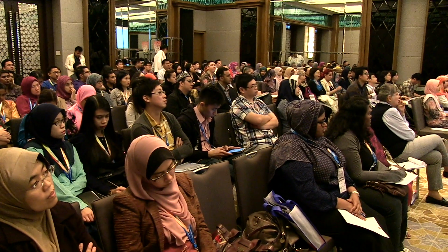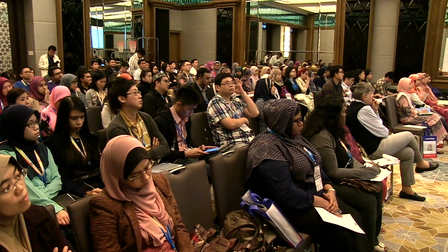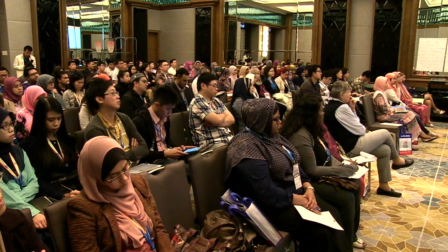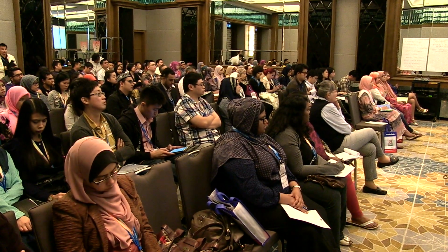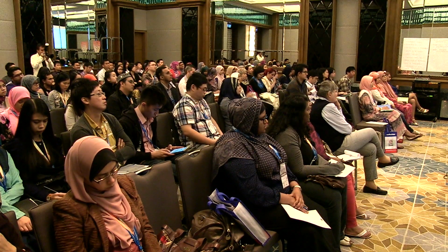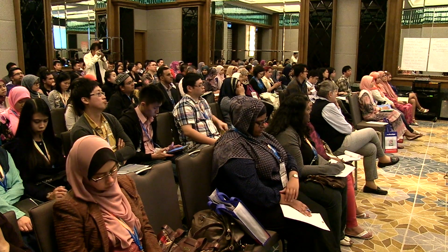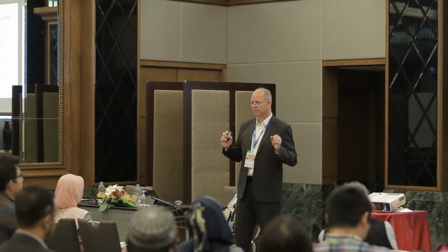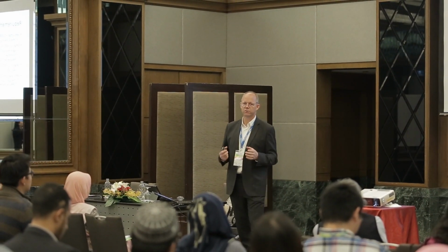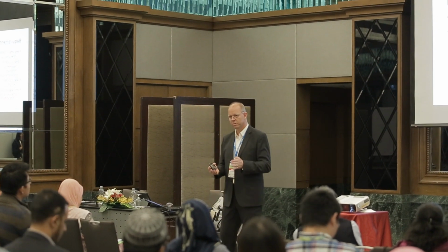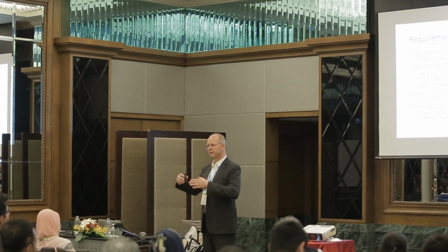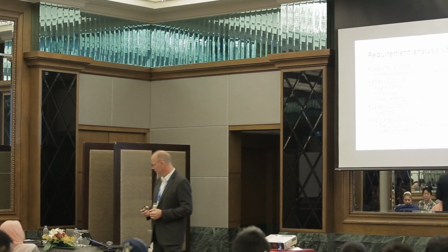We see that when we move up a little bit on the scale, say a small project of less than 1,000 function points, that's where the agile methodologies are really cool. Do prototypes, do requirement analysis tools. That's a different method you are applying in your requirement analysis. Still, what you do as part of the requirement analysis is you measure the size.